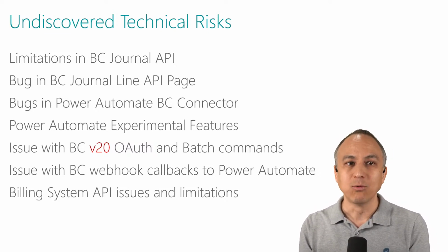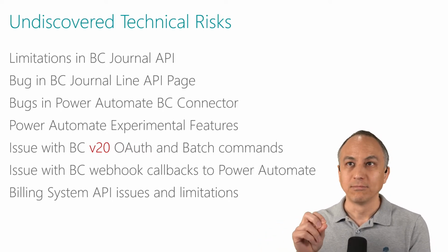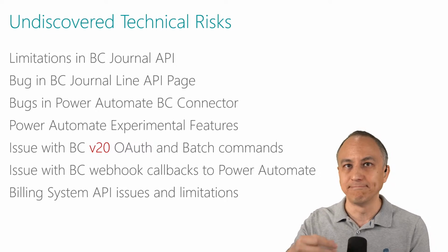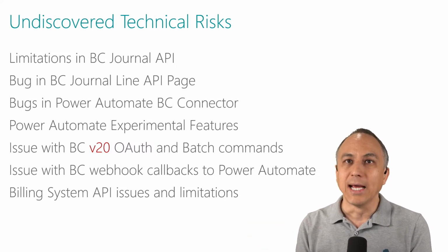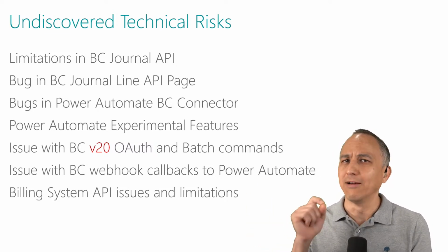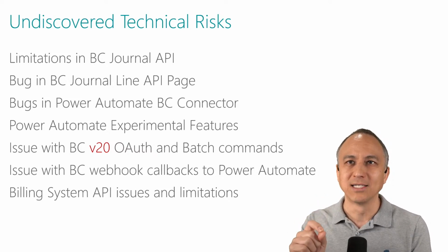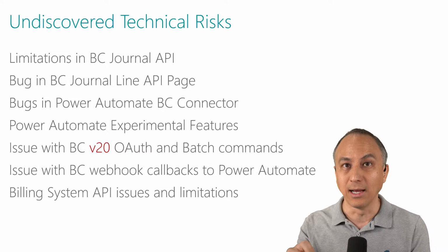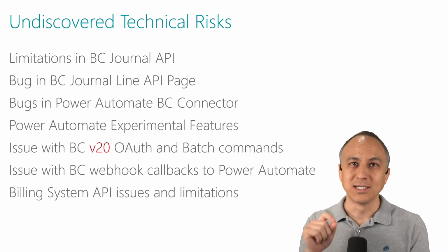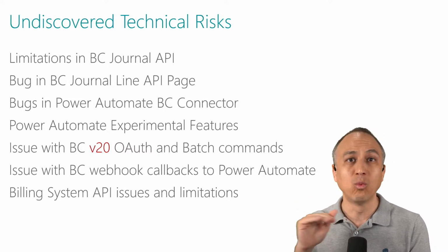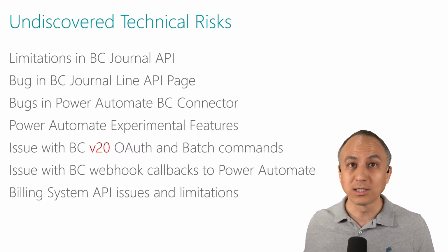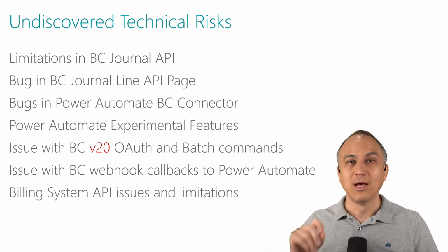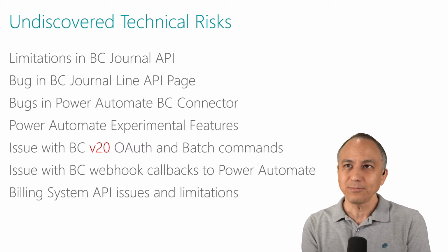Well, there is the one unknown for sure, because you won't have worked with that billing system, that SaaS billing system. I don't even remember the name. And I've learned through a very, very painful lesson, anytime you're working with an external third-party API, you have to consider that as very high risk. No matter what anyone tells you, whether it works, whether it's great, whether it has all the fields you could possibly want, very high risk.